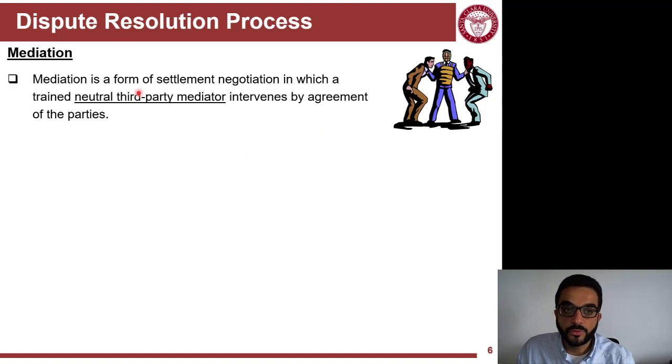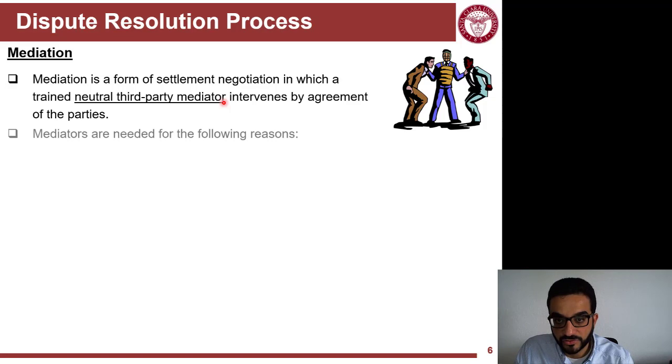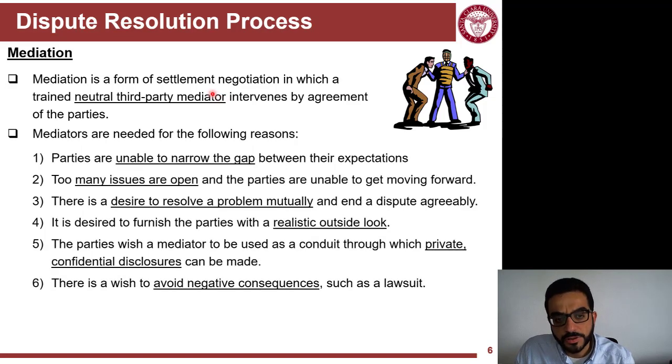Mediation is a form of settling disputes in a way that's still peaceful in some way. It requires a neutral third party. Both parties, the owner and contractor, agree on that third party. It can be a construction professional or a specialized company that provides such a service.